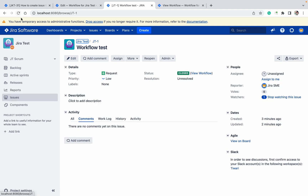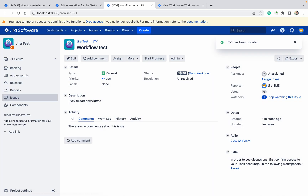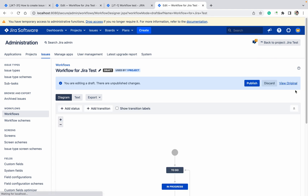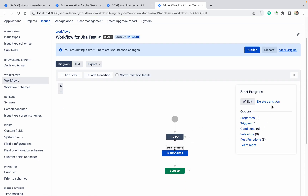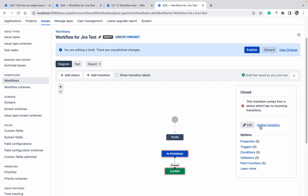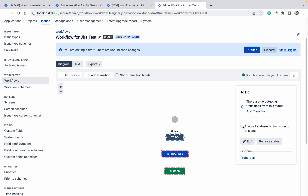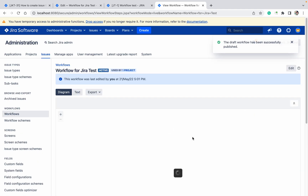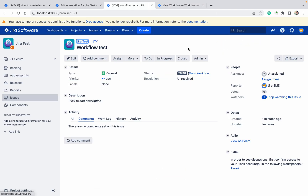After publishing, you can see 'Reopen' is available. Clicking Reopen puts the ticket back in To Do status, but I still cannot go to Closed directly. If you want all statuses to be reachable from any status, add 'allow all transitions'. Once published and refreshed, all statuses — To Do, In Progress, and Closed — are accessible from any status in the workflow.